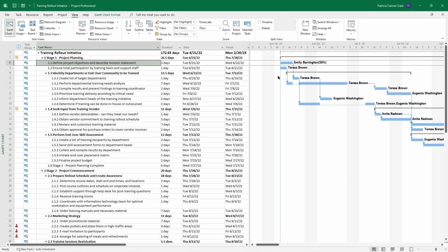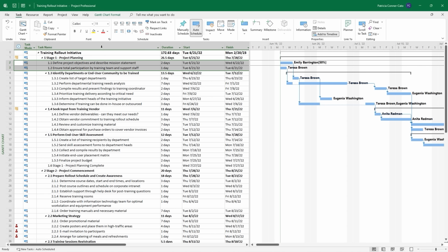And the first one we're going to track is percent complete. We're going to say that tasks 2 and 3 are 100% complete. So we can do that by selecting, I'm just dragging the row handle from 2 down to 3, and go to the Task tab of the ribbon. In the Schedule group, you'll see a series, and this is just one way of doing this, but you'll see a series of percentage icons, starting with 0%, then 25, 50, 75, and 100. With those two tasks selected, we're going to go ahead and click on 100%. And you'll notice a couple of things happened.